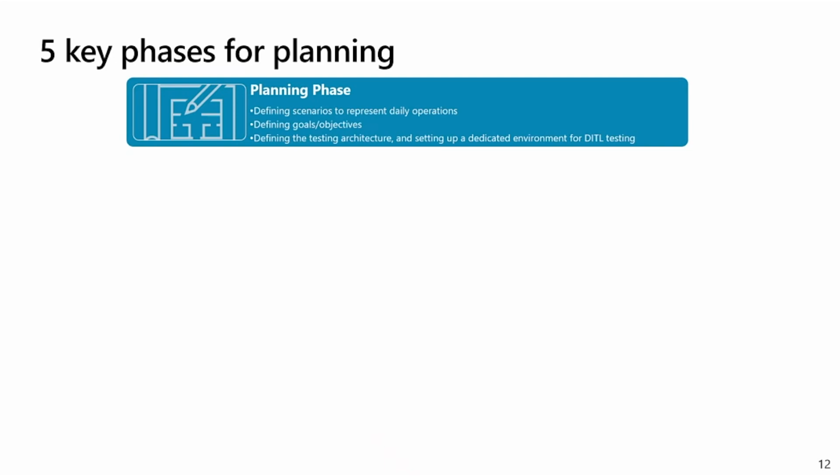In the planning phase, you should discuss and define the scenario in business daily operation. You should have the conversation with the key user, stakeholder, SME or partner, sitting together at a round table to come up with the agreed scenario that should be performed in the live testing. You need to follow all the key processes to simulate them in the live testing. We define as many scenarios as possible. That means the testing results should be more realistic.